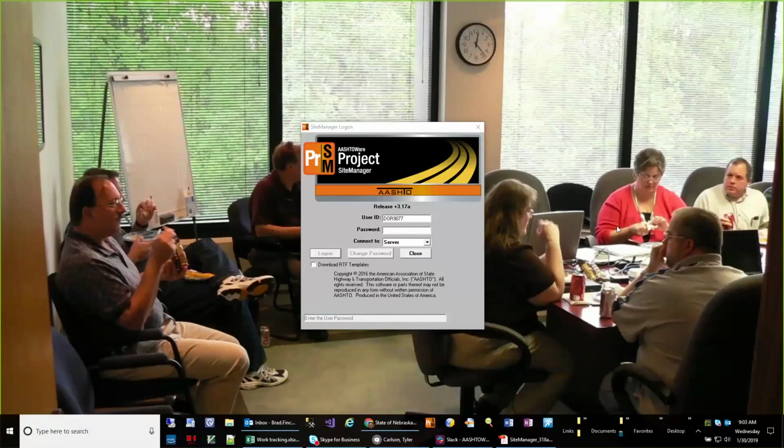I'll tell you a little bit about pipelining first, just a little background. Pipelining is what allows you to go out in the field without an internet connection and still be able to have your data entry. So you can create your daily work reports, your diaries, and also sample records.